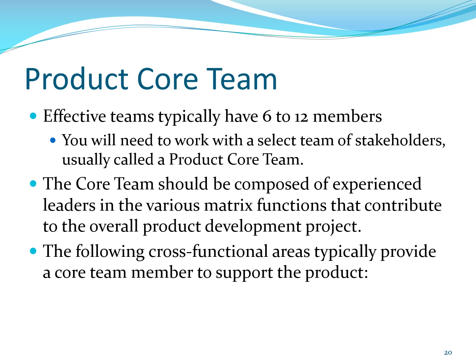core team. The core team should be composed of experienced leaders in the various matrix functions that contribute to the overall product development project. As much as possible, these people should be dedicated to your project and should remain with the product from the earliest stages until the completion of development. Besides the project manager, who serves as the core team leader, the following cross-functional areas typically provide a core team member to support the product.